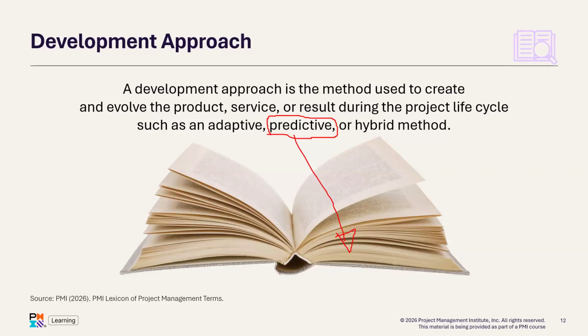Then it will be a waste of time to spend a lot of time in planning such a project into detail because those factors may not be in our favor, and then our entire plan may not be useful. So plan the project in cycles, and that's what we call adaptive approach. We are adapting to the changing condition, the changing situations to execute the project.